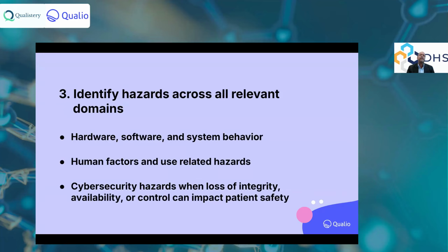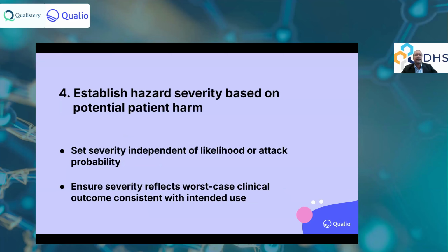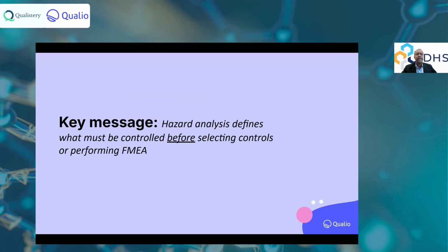And then you have to do this across all domains: hardware, software, system behavior, usability, cybersecurity, etc. And then establishing severity and trend becomes very important. Key message here is hazard analysis defines what should be controlled before you select controls and then perform a verification of controls.